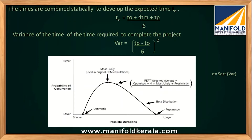PERT is also capable of calculating the variance and standard deviation, which tells us the spread. For example, we might say a project will complete within 22 days, but with PERT we can say it will complete within 22 days with a certain probability. PERT uses a beta distribution — not a bell-shaped curve — which will be discussed further in statistical quality control.